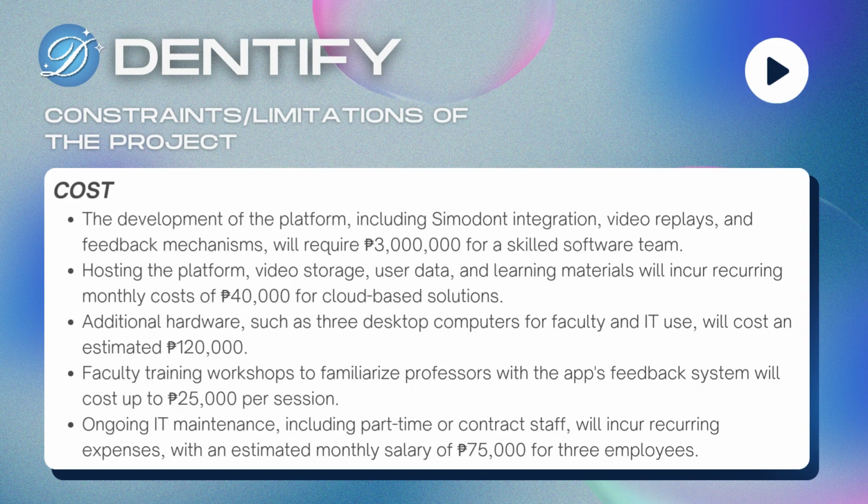Lastly, the development and implementation of Dentify will incur significant costs, including an estimated 3 million pesos for software development and features like Simodont integration, video replays, and feedback mechanisms. Hosting the platform will cost 40,000 pesos per month for cloud-based solutions, while additional hardware such as 3 desktop computers for faculty and IT use will total 120,000 pesos.